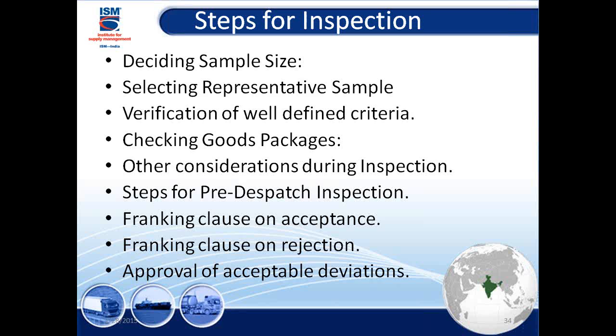Now, this is one side of the public sector, the way it is. I'm not questioning it. But when I look from the private sector, if you have ERP, e-procurement, we need only three things: purchase order, inspection report, and invoice. The moment the three things match, payment goes. If I'm going to go through these types of steps, who is going to enter it?